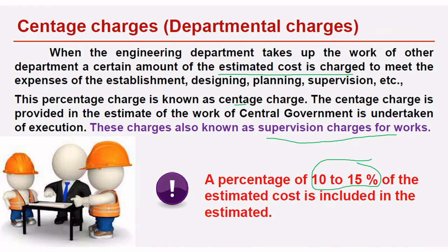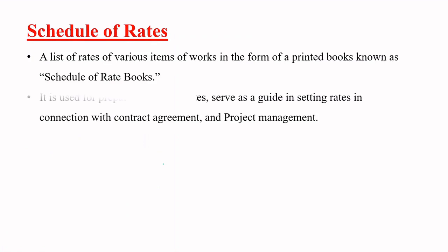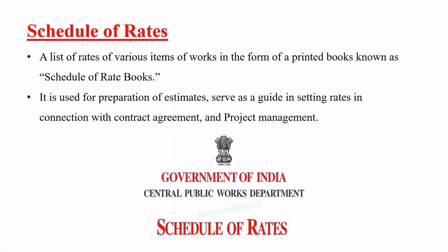Okay. So next one is schedule of rates. What is the schedule of rates? A list of rates of various items of work in the form of printed books is known as schedule of rates. It is used for the preparation of estimates and serves as a guide in setting rates in connection with the contract agreement and project management. The schedule of rates, or SR book, is provided by the government of India.